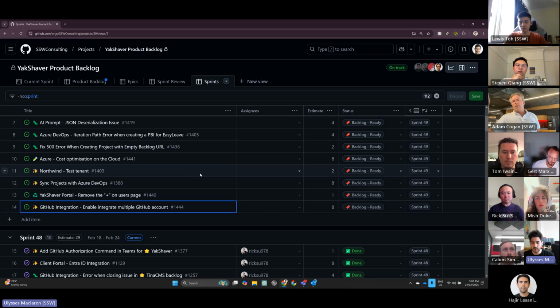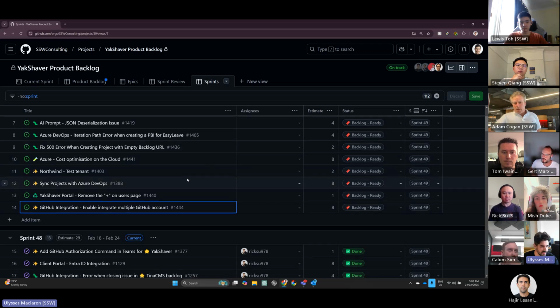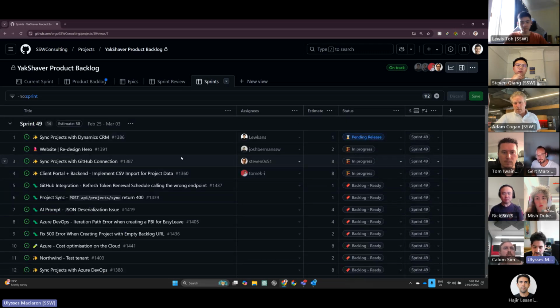So all of this, the only thing I took out, because we're sitting at 58 story points here, and our capacity was 60, the one I took out so that we would be under 60 is the end-to-end test. So literally, if we get all this done, we're ready to actually see it in anger, which is great.